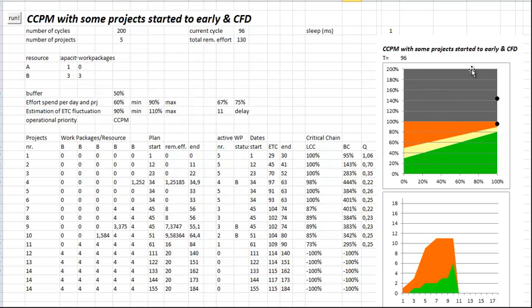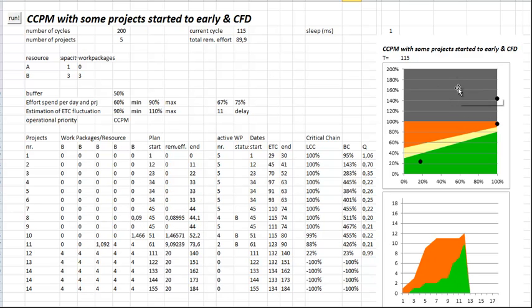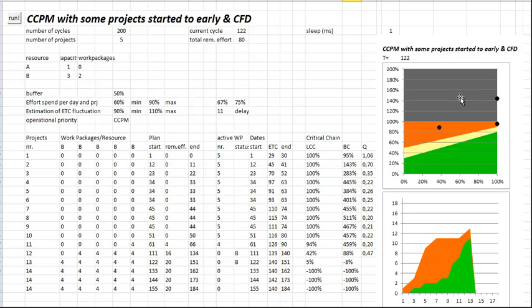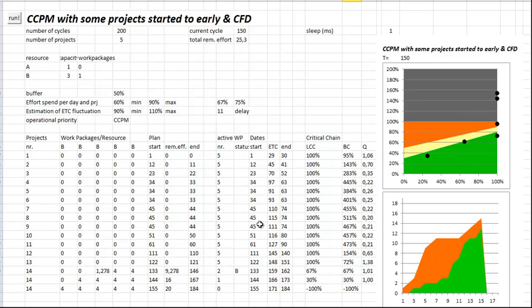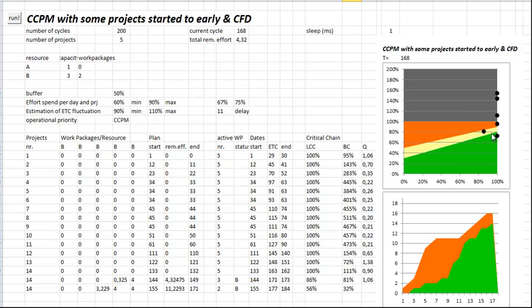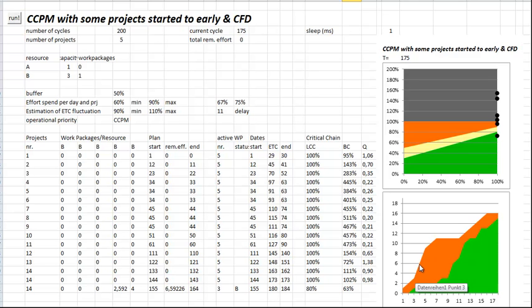Now the much too much projects are started and you see the negative multitasking in here. The dots are going into the black, they go far above the buffer consumption. Now it's back to normal and the projects are walking upwards at 45 degrees. So now let's have a look at the CFD.